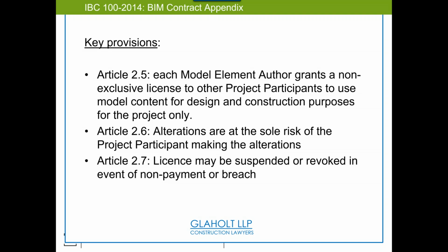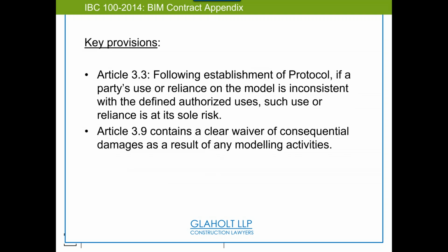2.7, licenses may be suspended or revoked for non-payment or breach. So basically, yeah, we're not sharing. If I'm not paying you, you're not paying me, we're not satisfying the payment terms of the contract, or you've breached any of the other clauses, you can't use stuff anymore.